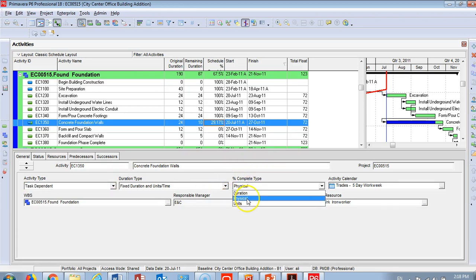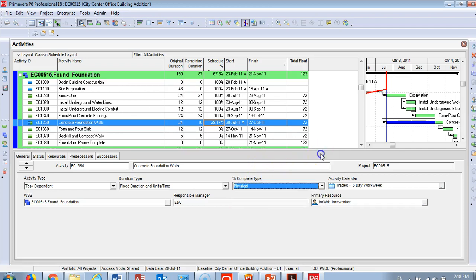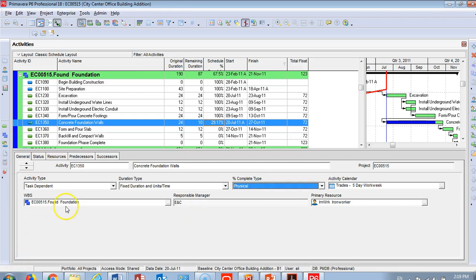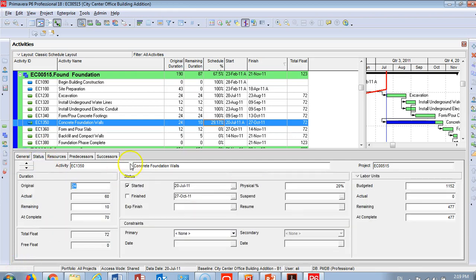Keep the duration type as default. The important field here is the Percent Complete Type — duration, physical, or units — and you need to know the difference. Also check which calendar the activity is working on, the WBS, who is the responsible manager, who is the primary resource, and who will give you the update on this activity.